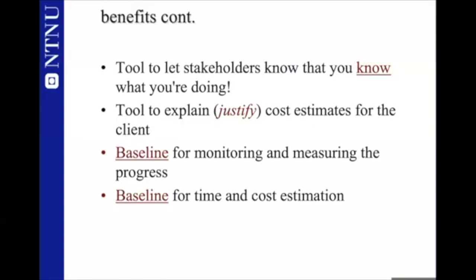So they develop a complete work breakdown structure. They don't call it work breakdown structure, but they call it product work breakdown structure. But in this product work breakdown structure, they specify everything. And then they go to the client and say, okay, this is your request. Here it is on paper. And it will cost you 20 million kroner.